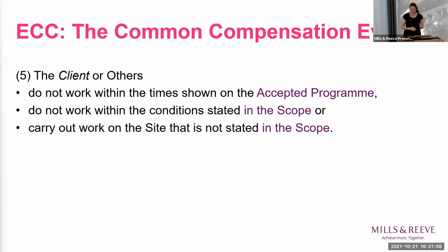So as Alex said earlier, the programme is extremely important in an NEC contract. And under clause 31, the contractor will take this information from the scope and will feed this into the accepted programme. However, clients, please be aware. As Alex has said, the accepted programme will change. And we have these horrible deemed provisions where the project manager misses the timescales for accepting a programme. So clients and others, do you know how that's changed? And do you know what the consequences will be? This means that there needs to be really good communication between the project manager, the client, and the wider team.